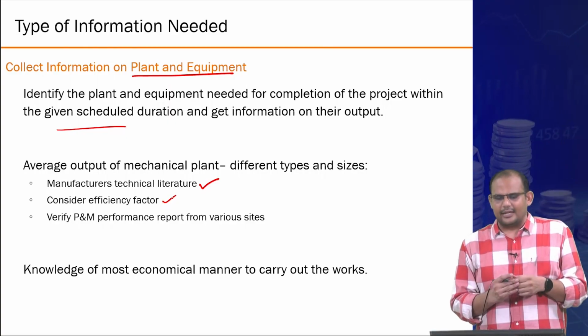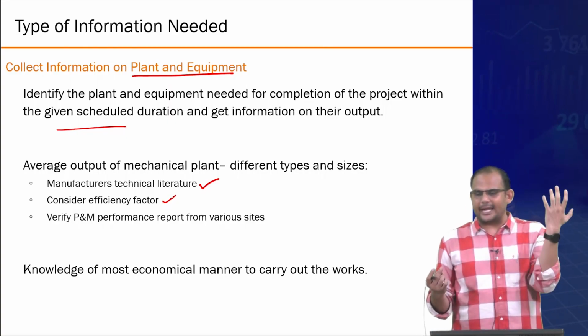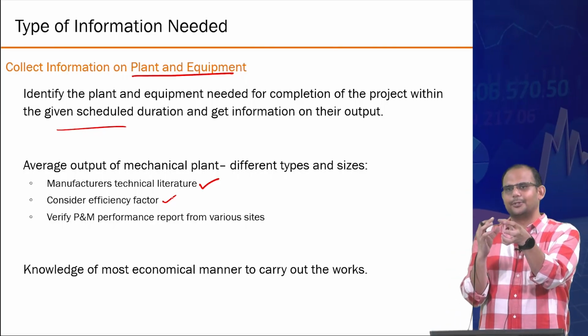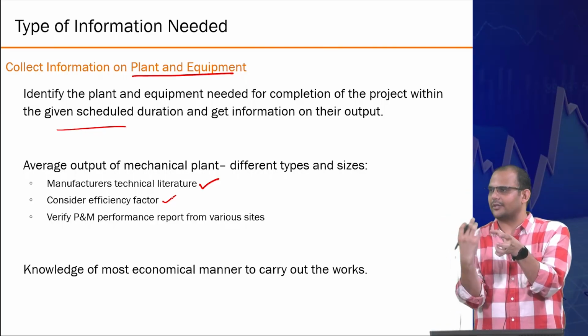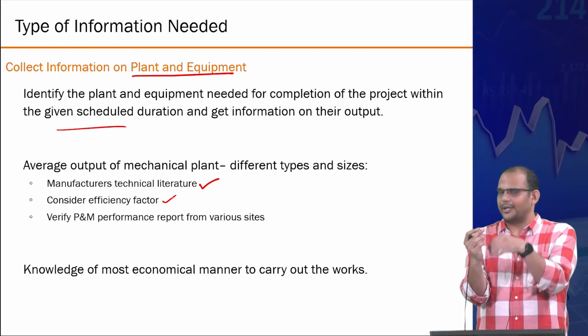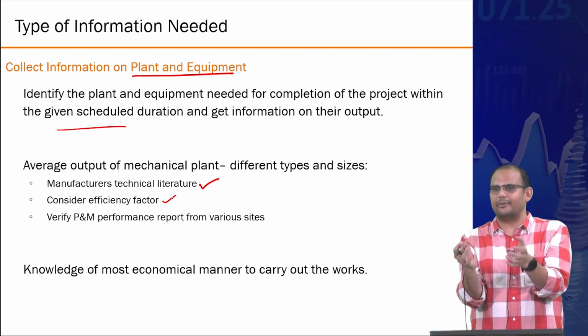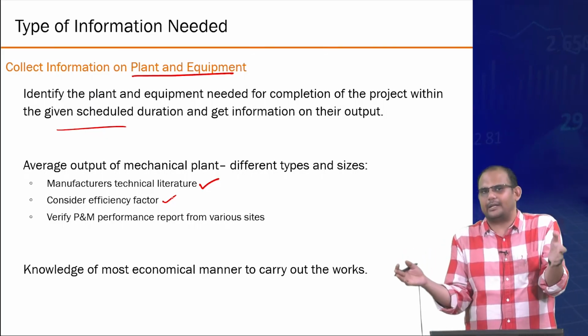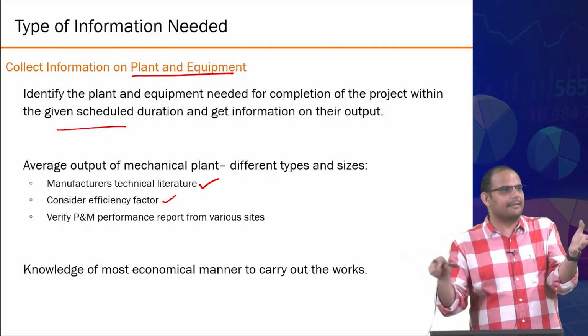And then the machine itself may not break as much, but the machine is clubbed with a human. So the average efficiency of both of them needs to be taken into account. A human will require some break, even if you are doing a simple job, just pressing a button. You can't keep on pressing the button for 8 hours at the same efficiency level.